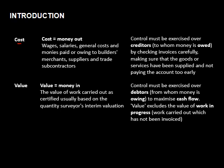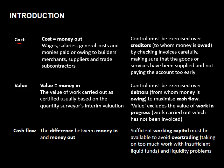Your value excludes the value of work in progress — work carried out which has not been invoiced yet. Please bear that in mind. We're going to look at retention and those items as well. Cash flow is very simply the difference between the money in and the money out. Sufficient working capital must be available to avoid over-trading — taking on too much work with insufficient liquid funds will lead to liquidity problems.